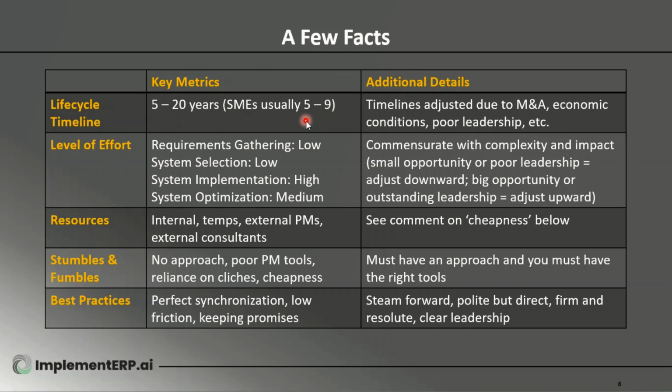Well, a system selection with the business requirements and all that, 6 months to 12 months, okay? Perhaps 12 months from a calendar timeline, but 6 months of actual activity. Then you have the implementation, which could be, like I said, 4 months if it's very, very narrow and for a simple company. Most often, I'd schedule 2 years for companies that are doing a project.